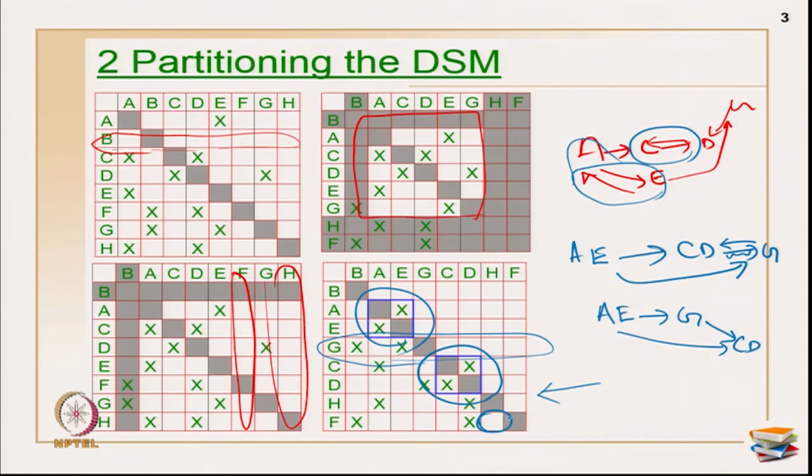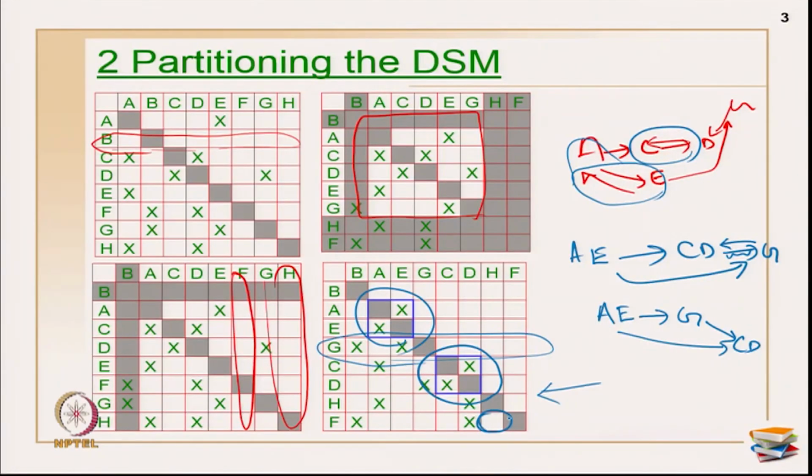What you have to do is first identify the top activities, the starting activities, by identifying all empty columns. Once you merge one activity, see whether any more empty rows are there, and keep moving that process. In the same way, use empty columns to identify the last activities, keep identifying the last-but-one activities, and finish the process. In between you have some loops, and there may be one or two blocks, or independent or dependent activities coming with them. You have to identify that.